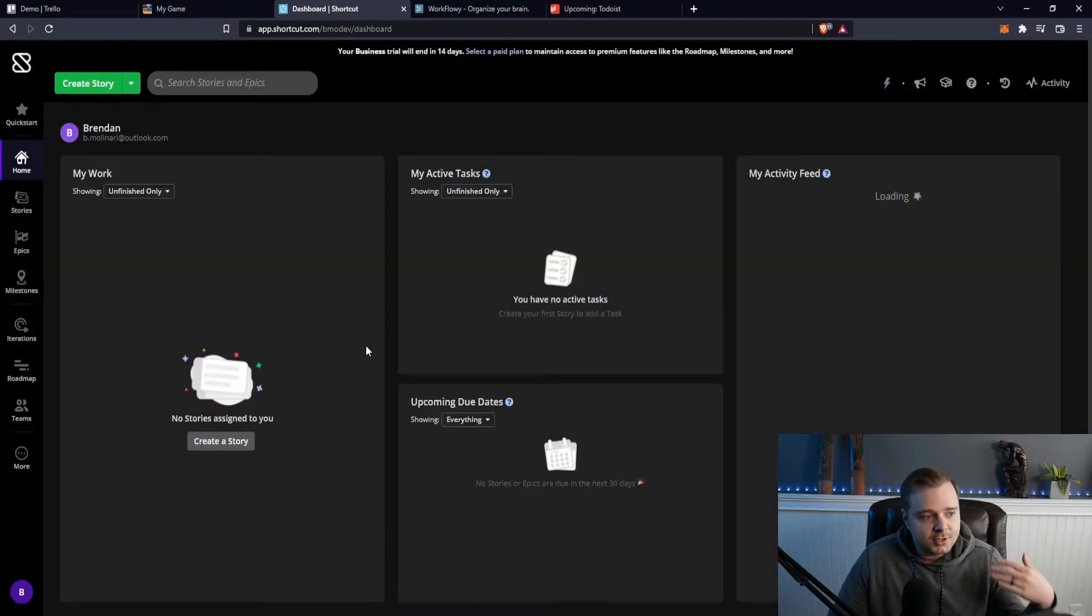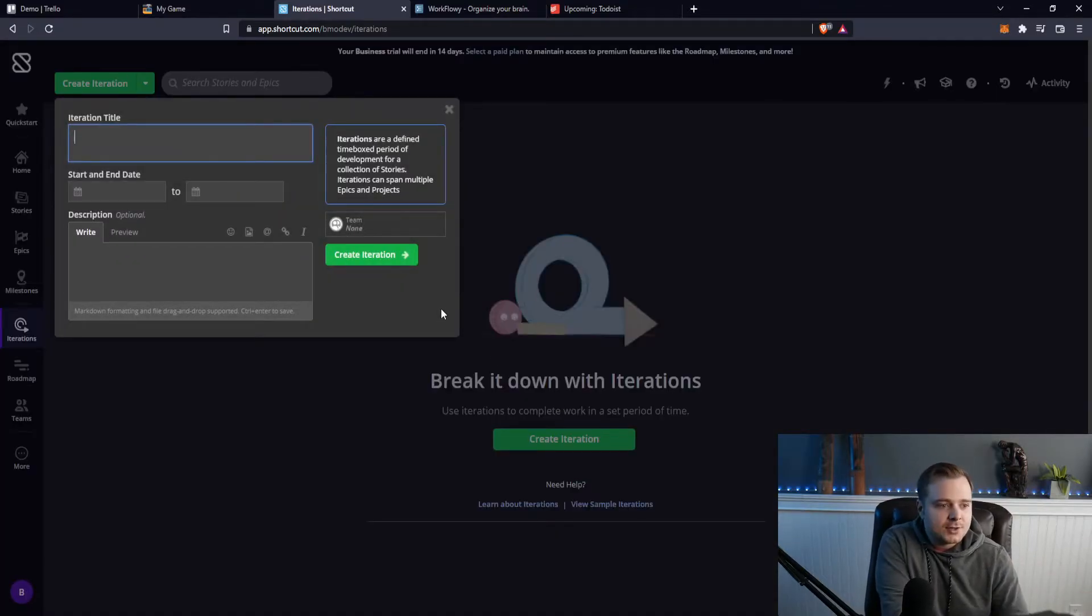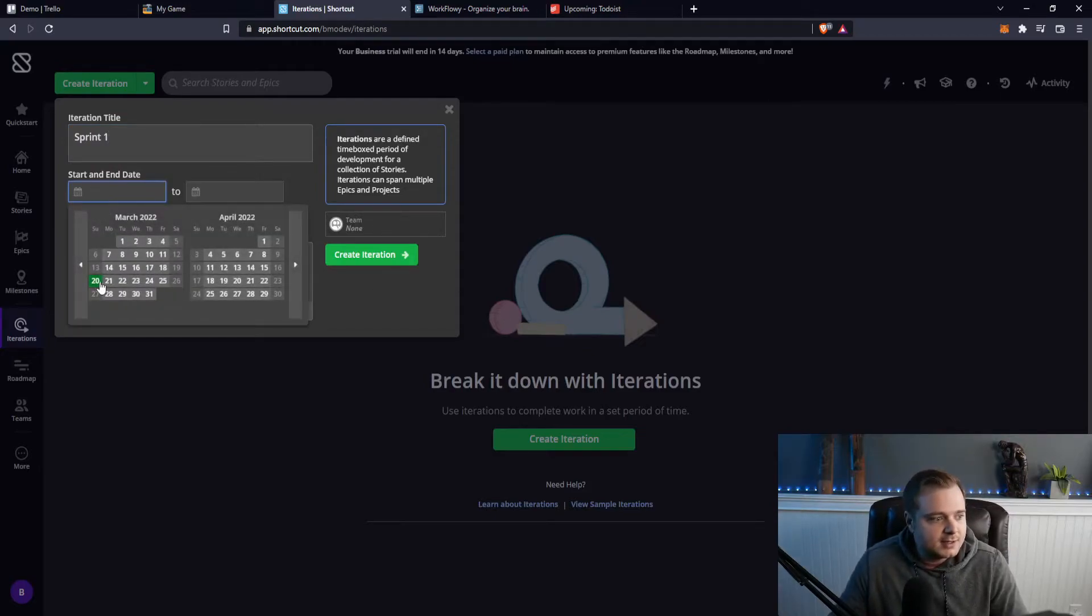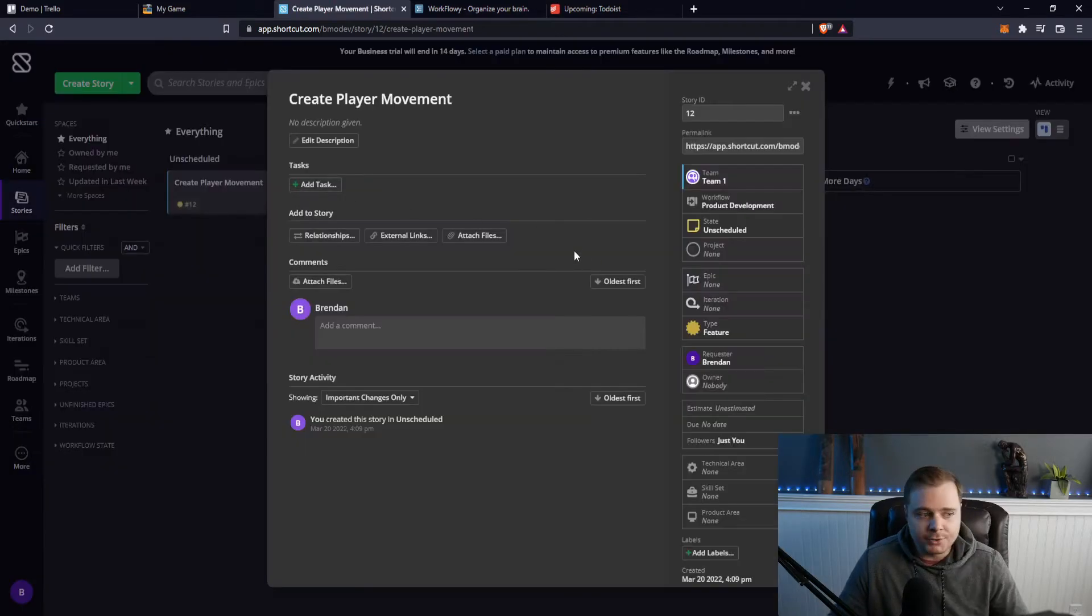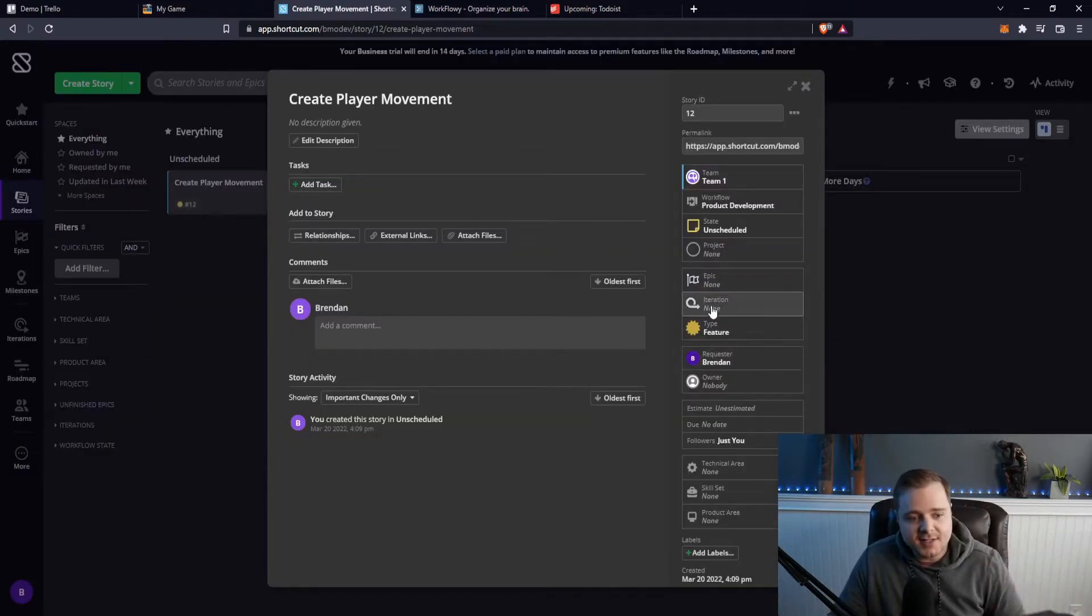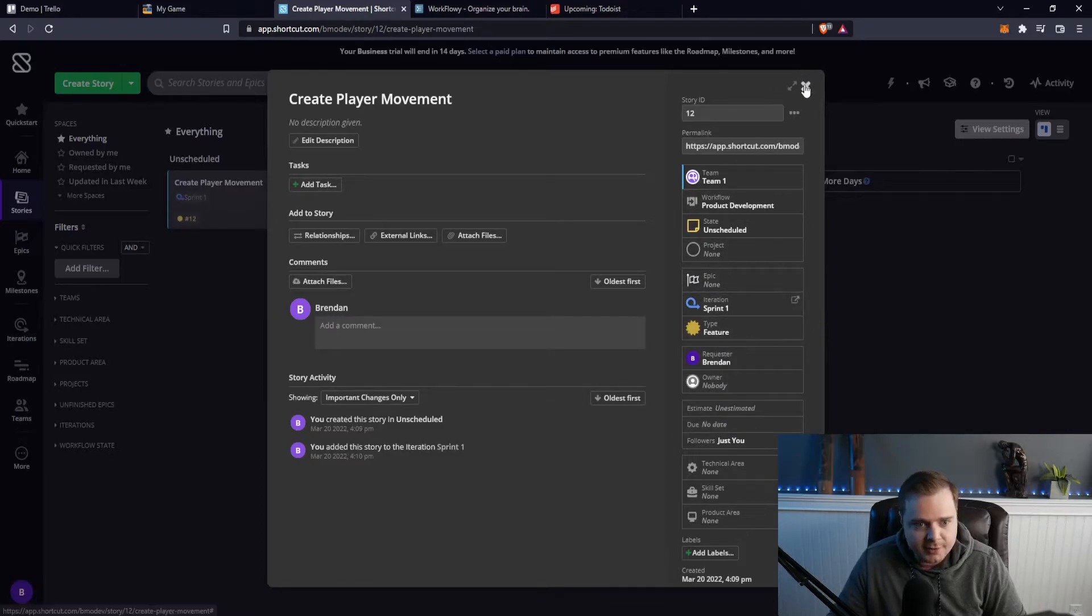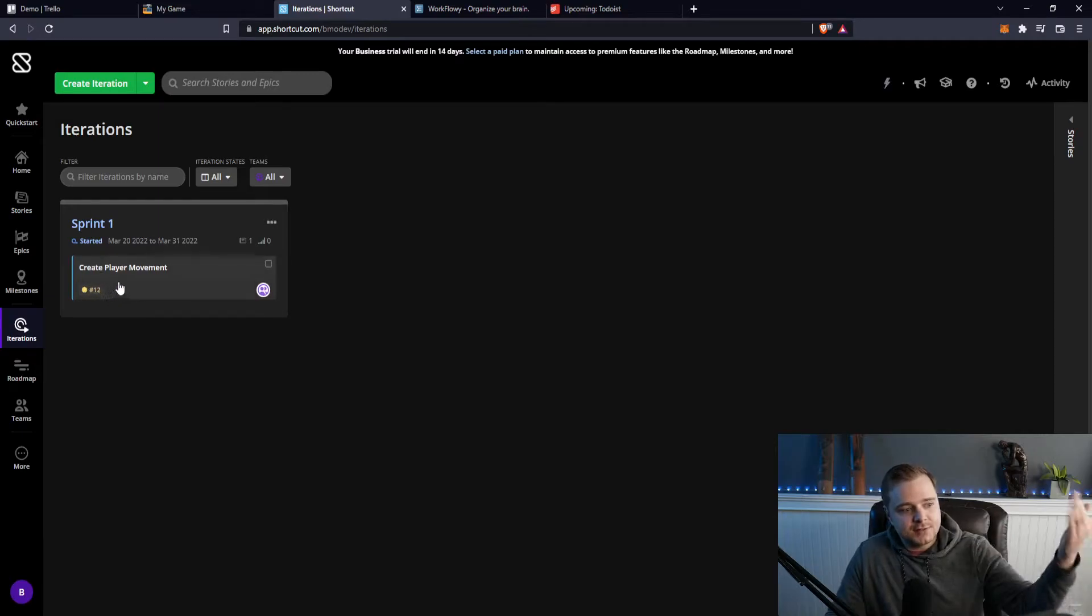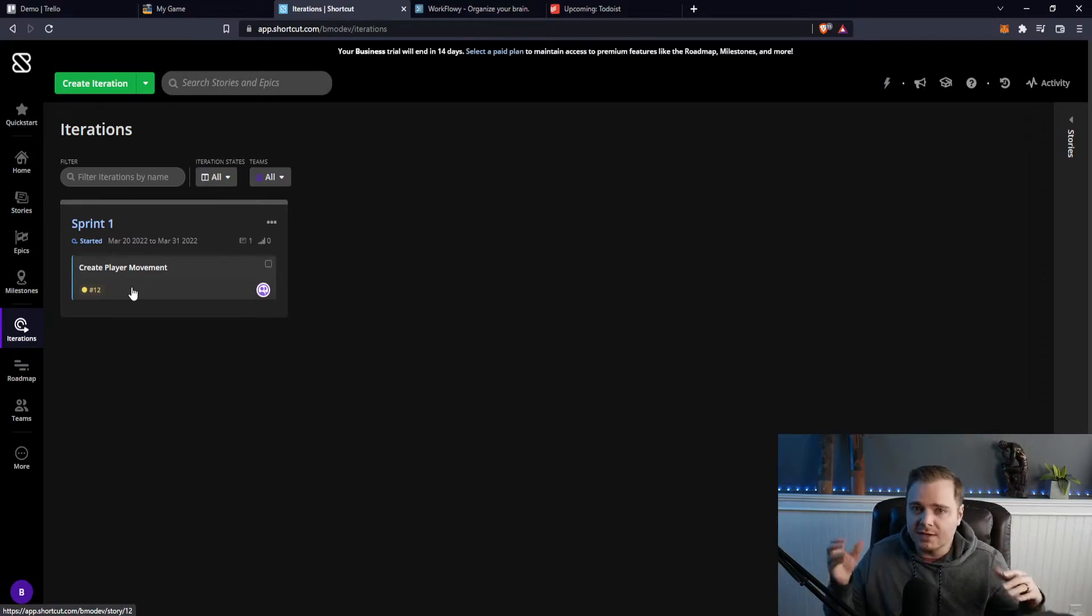And so you could create stories. And then in here what you could do is basically create an iteration, which is known as like a sprint. So this could be sprint one and you can give it a start and end date. So I'll just say like today to next week or whatever. And so going back to this create player movement story we just made a second ago, I can go to iteration and assign it to sprint one. And then if I go here, you'll notice this is now in our sprint that's slotted from March 20th to March 31st. So this is again really useful if you have a team.